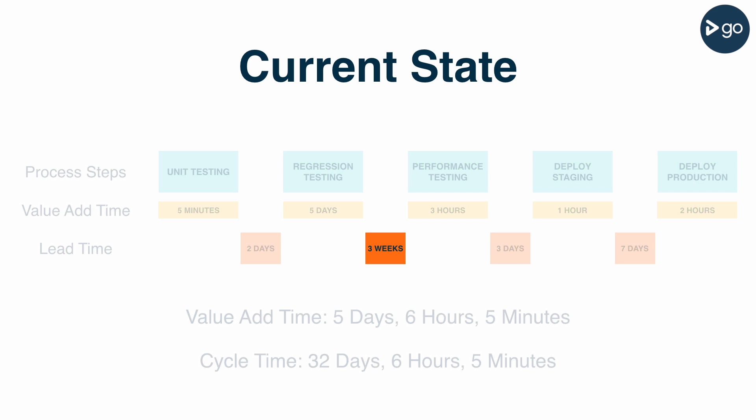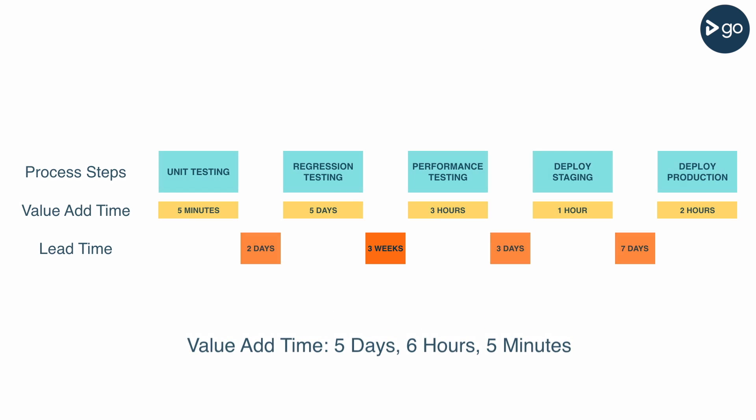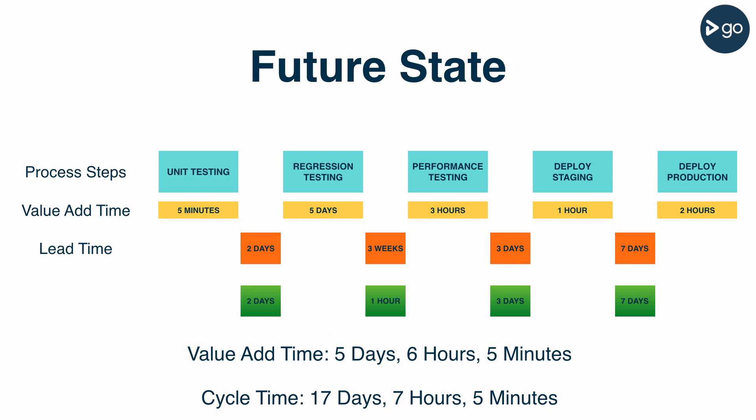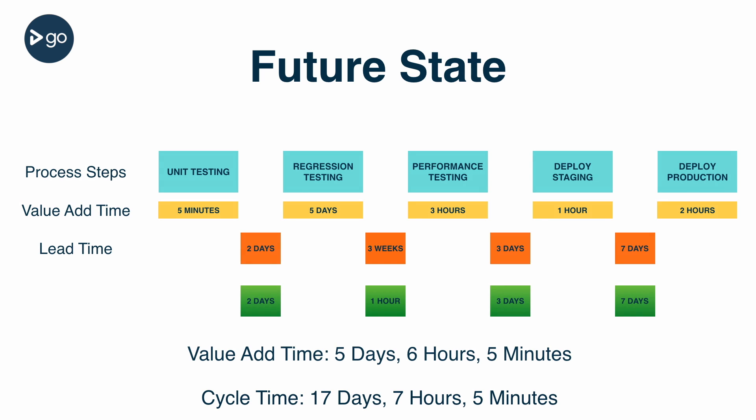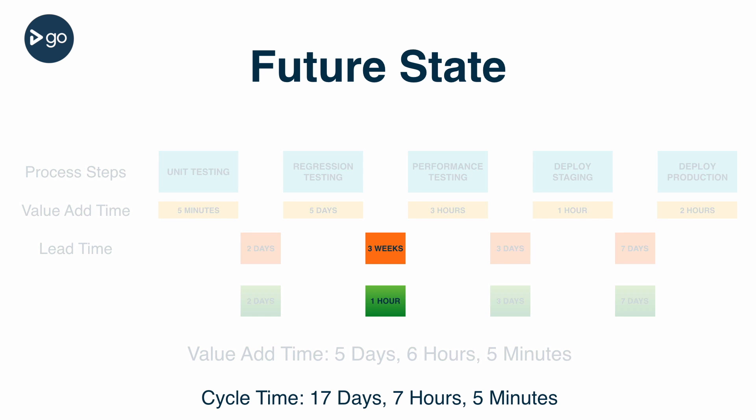The next thing we need to do is map out our desired future state. Again, this is an overly simplistic example, but after much discussion, we've decided that we can reduce the lead time for performance testing by automatically provisioning performance testing environments. In this example, changes to our process would cut our cycle time from 32 days to 17.